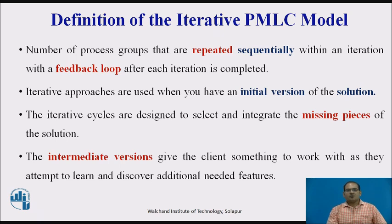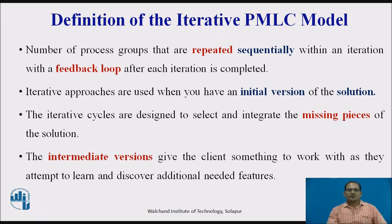An Iterative PMLC Model consists of a number of process groups that are repeated sequentially within an iteration, with a feedback loop after each iteration is completed. Iterative approaches are used when you have an initial version of the solution, but it is known to fall short in terms of the features and functions. The Iterative Cycles are designed to select and integrate the missing pieces of the solutions or to add new features. Think of the Iterative PMLC Model as a variant of production prototyping.